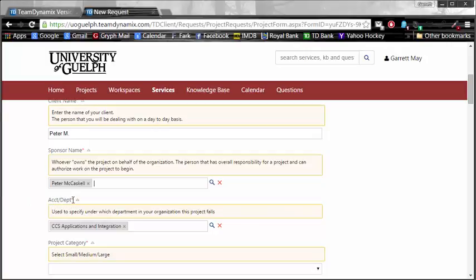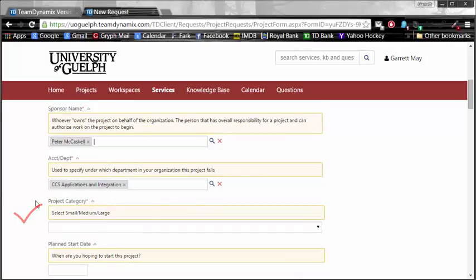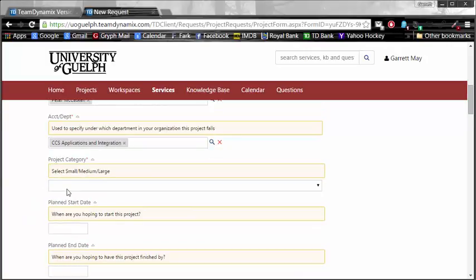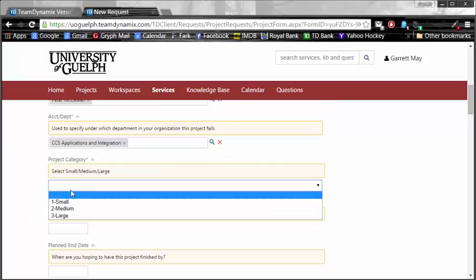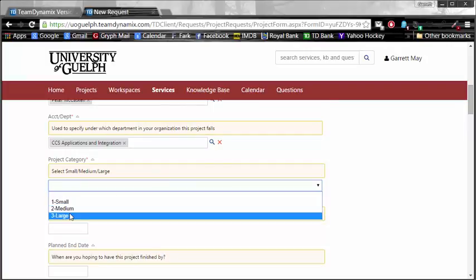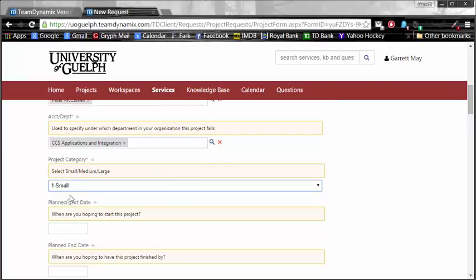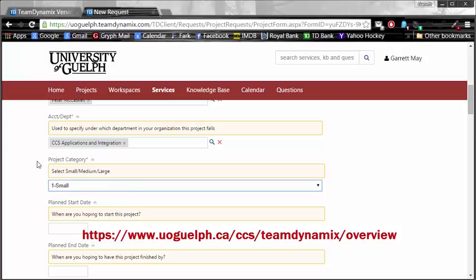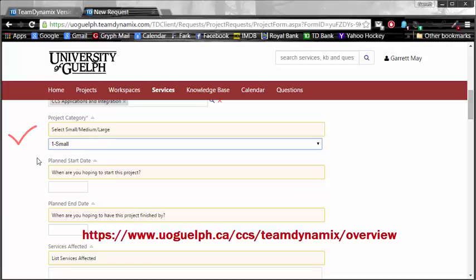For the Account Department, it is a required field, and you will have to specify which department you're doing it for, and the project category. There are three categories: small, medium, and large. Additional information can be found about those projects on the help pages, which can be found on the link which is now showing up on your page.